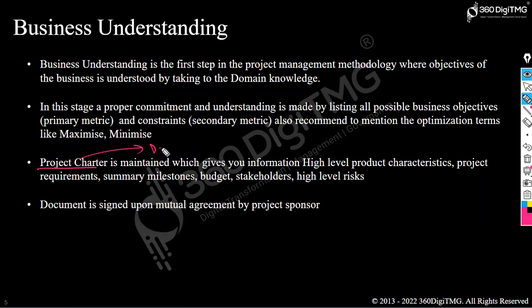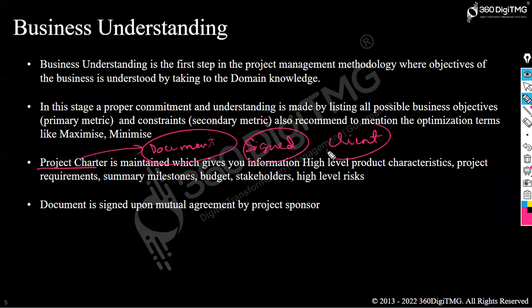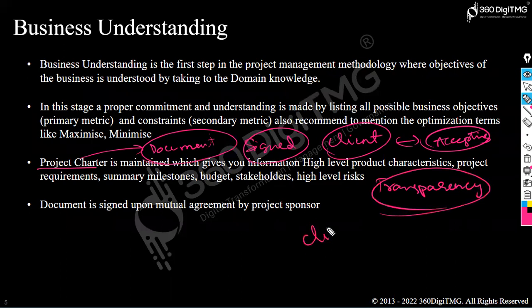A project charter is a document that will be signed by both the people who are giving the project and the people who are accepting the project, so that the work will have more transparency. Later, the client should not say that they have already told this and that, and there should not be any amendments.